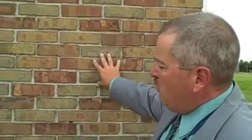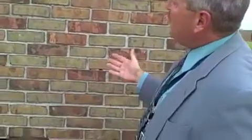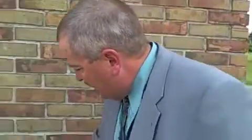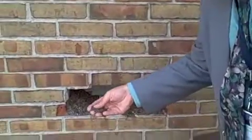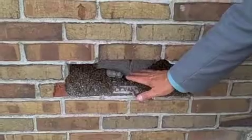Norwell High School in the A section. We are replacing the small brick, it's called brick veneer, because it's on the outside of the cinder block. Okay. What we would expect to find in the construction is that there would be an insulation value between the brick veneer and the cinder block. And this actually is the old insulation. And a hole has been busted out here about waist high, so about 3 feet high.